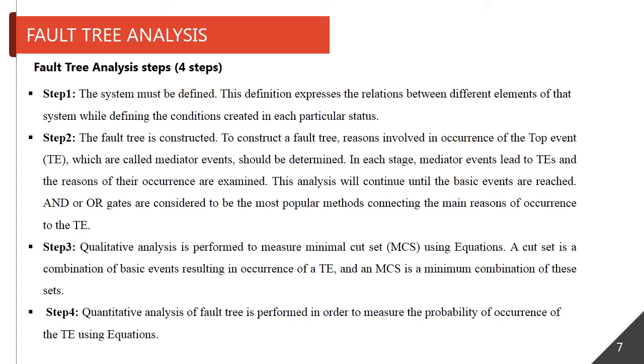Reasons involved in occurrence of the top event, which are called mediator events, should be determined in each step. Mediator events lead to a top event and the reasons of their occurrence are examined. Step 3, qualitative analysis. It is performed to measure minimal cut sets using equation as mentioned in our paper.